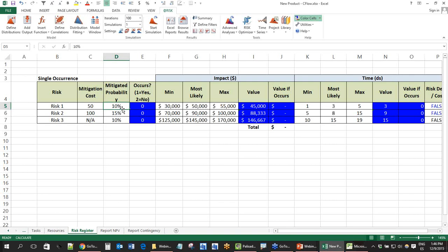What happens with the qualitative risk register? When you have, this is high, very high, medium, low, etc., you will have to translate that, because lots of companies have these qualitative risk registers, but at a certain point you will have to translate that into numbers. So you will have to define a scale where you say, well, very high is 80%, high is 60, medium is 40, etc. Right? This is done by using a Bernoulli distribution, and this distribution is going to look like this.